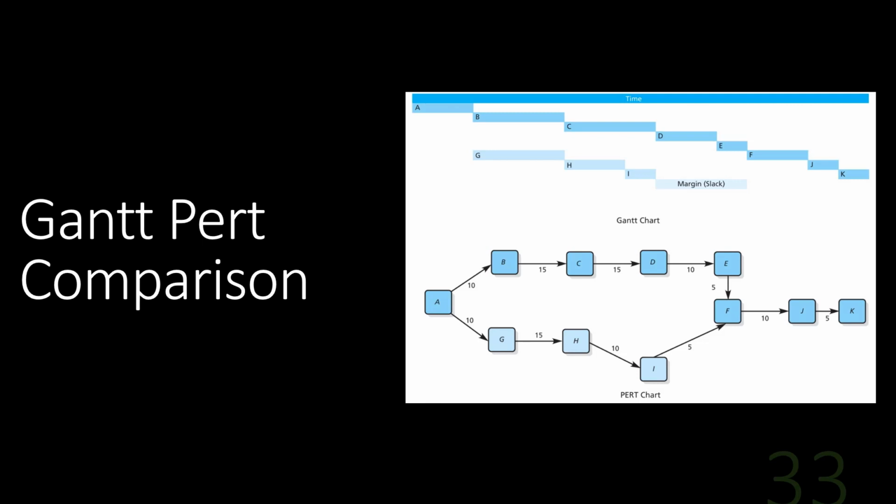So with the combination of being able to lay out your tasks, your dependencies, your individuals working on them, how much time they have available, you can set up, and all project planning software allows you to kick out a Gantt chart or a Pert chart automatically once you've got the project set up. You don't have to create these from scratch, but you will want to use them to help fine-tune your project plan, and you'll identify mistakes certainly when you first lay out your project. Well, we've got Jimmy scheduled for 36 hours on that one day. I don't think that's going to work so well. And then you have to adjust.